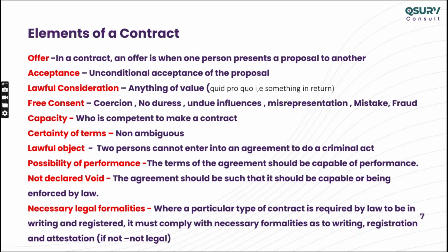So when you submit back the RFP, there's a LOT, right? It is the full compliance with all the ITT documents, and you put the amount also. Letter of tender is a part of the contract also. Form of tender, right? When you prepare the contract, LOT is a document also, in the FIDIC form of contract. But letter of tender usually comes as a priority after letter of acceptance, right?